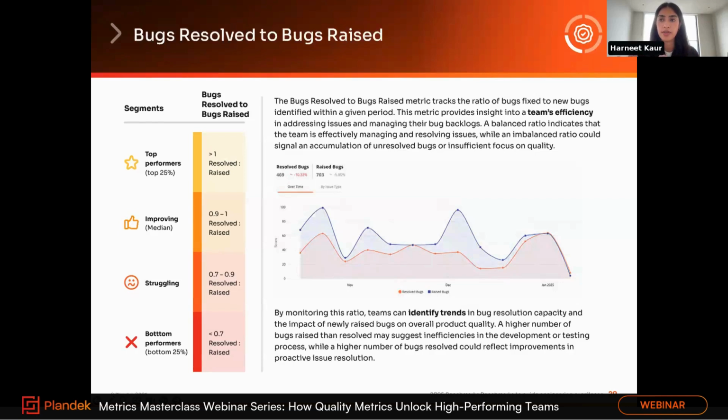People are strongly focused on that kind of value-add work and haven't been keeping an eye on the bug backlog. And also maybe some inefficient resources. So actually, do you have enough people to be doing the testing in the phases, or pick up bugs as well? So do we have enough people to manage the workload that's coming in? And then what's super powerful about this, it also shows you sustained quality effort. So are the teams allocating time each sprint to fix bugs?